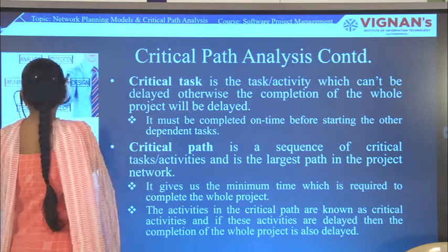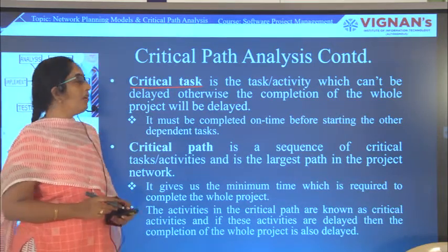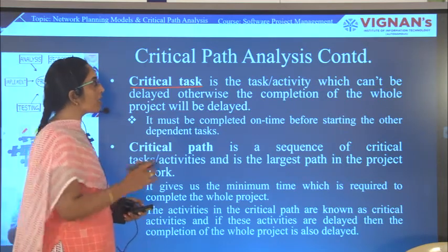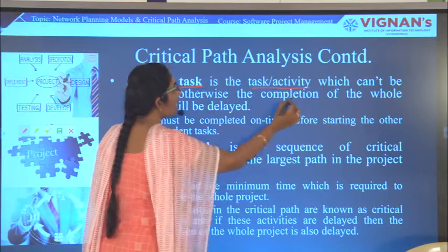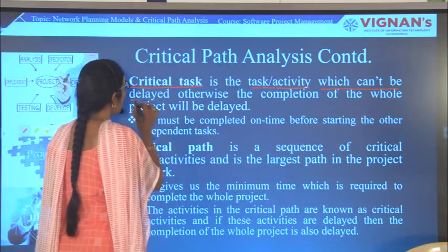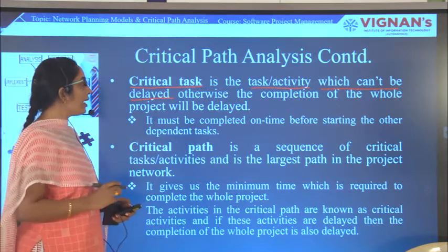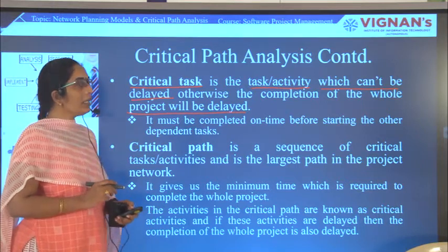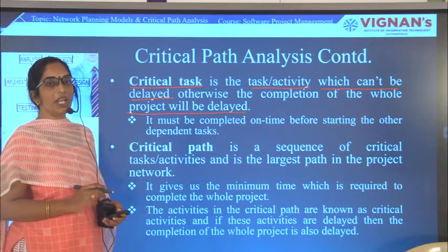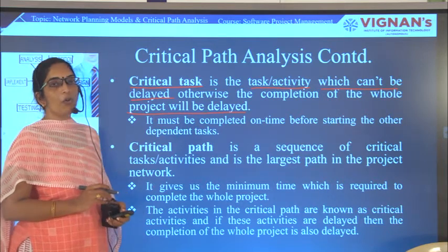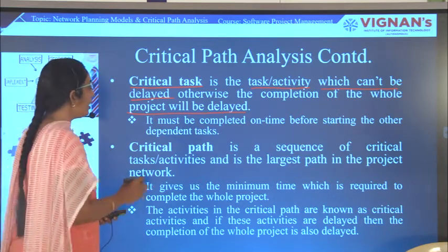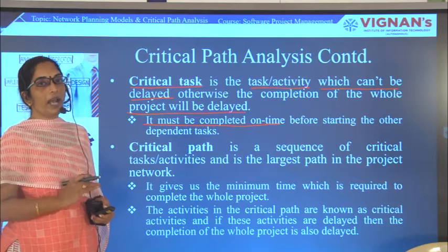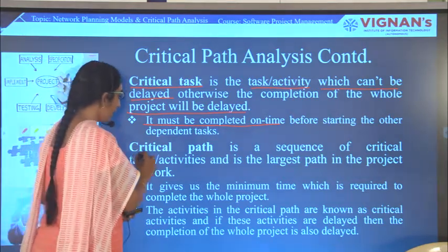A critical task is a task or activity which cannot be delayed. If this is delayed, the whole project will be delayed, and it must be completed on time before starting the other dependent activities. And the next one is critical path.